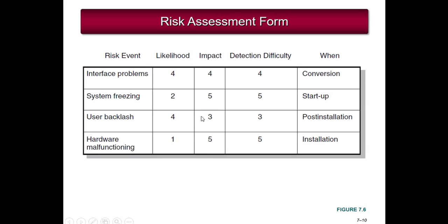The risk assessment form lists the different risk events, and it documents the likelihood of the risk event occurring, the impact to your project, and the detection difficulty, how easy is it to detect, and when would it actually occur.